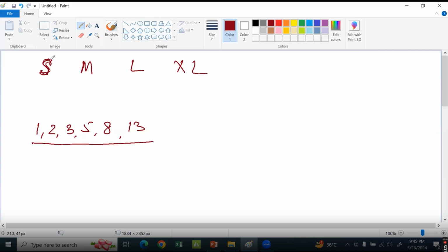So we can say, all small user stories we will assign, say, 1 story point. All medium, let's call it 3 story points. All large, let's call it 5 story points. And we'll understand what the value of a story point is, we'll talk about it. You have to use a number from this sequence only. You can't use 4. You can't use 6. You can't use 7. You can't use 9. You have to use these numbers only.